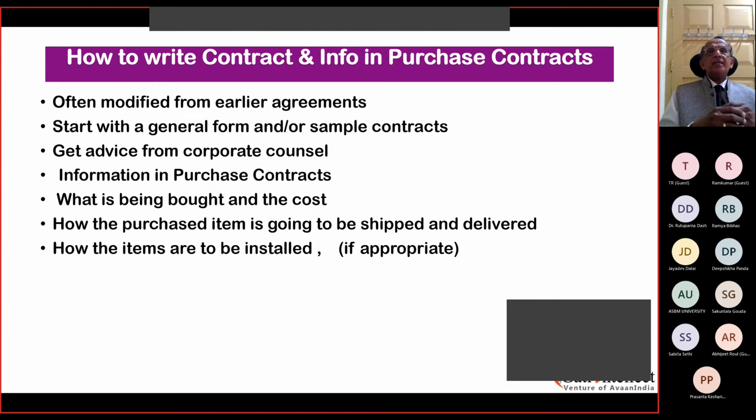In most cases, the foundation is on the ground level, so it's always easier to move it from the trailer by a hydraulic jacking system to the foundation. We had a case in Riyadh. They said the foundation is on the first floor. Nobody could ever imagine that there is a foundation on the first floor, and we were really caught.